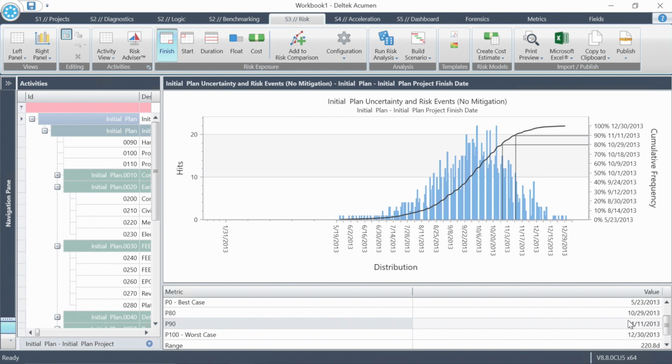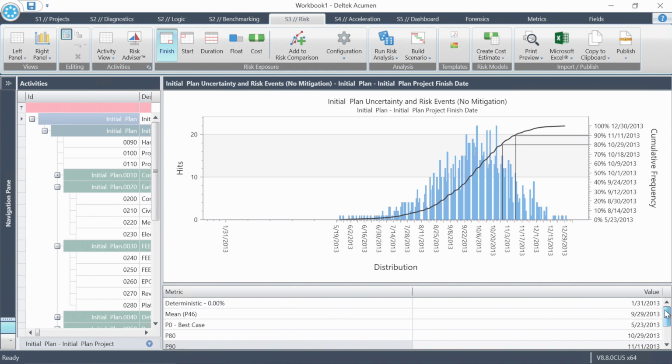If management doesn't like it, it's time to go back and evaluate those risk and uncertainty factors and make sure that everyone had their best foot forward when you were making that risk assessment. But these numbers don't lie. The simulation is robust, and this project, if these factors are real, should be planning not to finish on the originally forecast date. That can be a tough pill to swallow, but it's the reality of the situation.